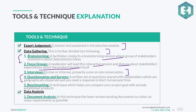Questionnaires and surveys are written sets of questions shared with stakeholders who are geographically dispersed, needed when you require a response in a short turnaround time. For example, after buying something online, you receive an email asking about your experience, if the product met your requirements, or whether you'd like an upgrade. Companies use surveys to gather lessons learned directly from end users to improve their product.